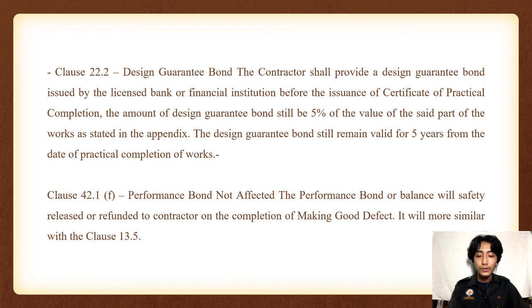Next, for clause 42.1f, performance bond not affected, the performance bond or balance will be safely released or refunded to the contractor on the completion of making good defects. It is more similar to clause 13.5. So that's all for me.